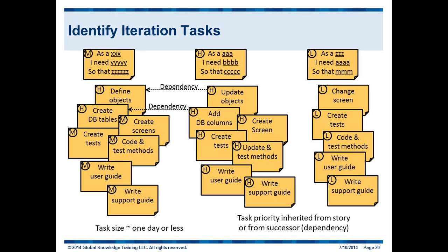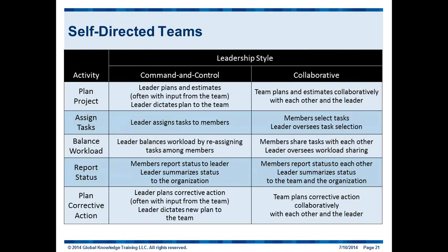So we prioritize our stories within the sprint, we identify the tasks, estimate the tasks, assign the tasks, and then start to work on them in priority order, making sure that we're minimizing our work in progress. So start less, finish more should be our guiding principle.